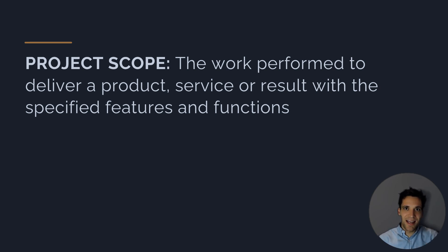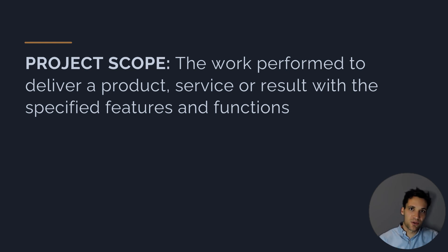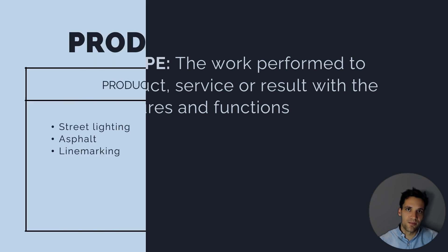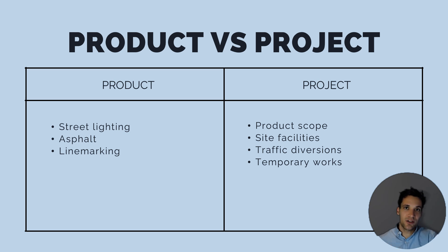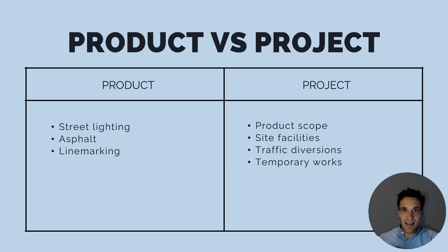Project scope is all the work we need to do to complete the project — it obviously includes building the finished product, delivering the bridge with the lighting and the lanes, but it also includes other works. For example, we might have to set up temporary site facilities or relocate services — work that doesn't necessarily form part of the finished product but is included in our project scope. So product scope would be the street lighting, the asphalting, the line marking, while project scope includes all of that plus temporary works, site facilities, and organizing a security guard — tasks that don't form part of the finished product but are in scope.